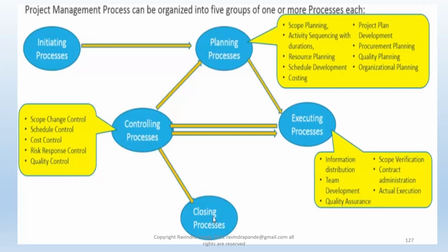Now there could be a very small change request, a 10-15 minute type of effort, then we might include it in the current sprint as well, just to make sure client business doesn't get disturbed by our development. We might have planned earlier, but the client business priority does change sometimes, right? So for all such change requests, we have a change control board who supervises this change, who re-estimates this change, and then gives it to the project manager, trying to get the best out of this change request. We might bill this change request additionally to the client. This is for the change request or scope change scenario.